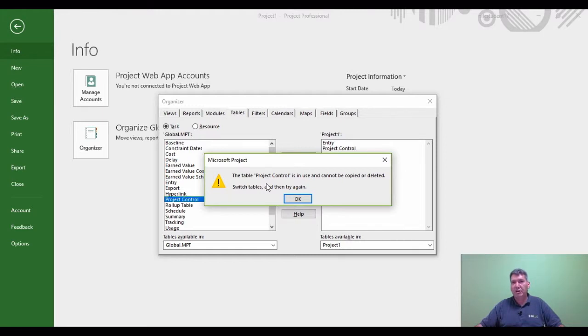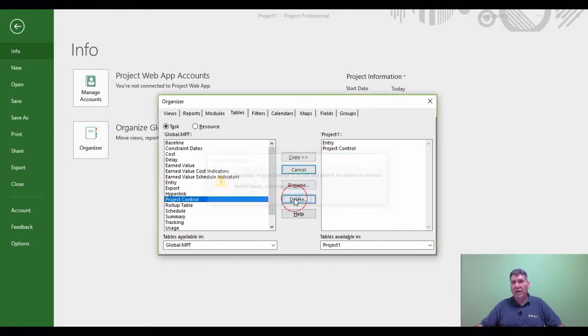And the reason for this is, if you've got a table that's already being viewed within a project, you cannot delete the table when it's being viewed.